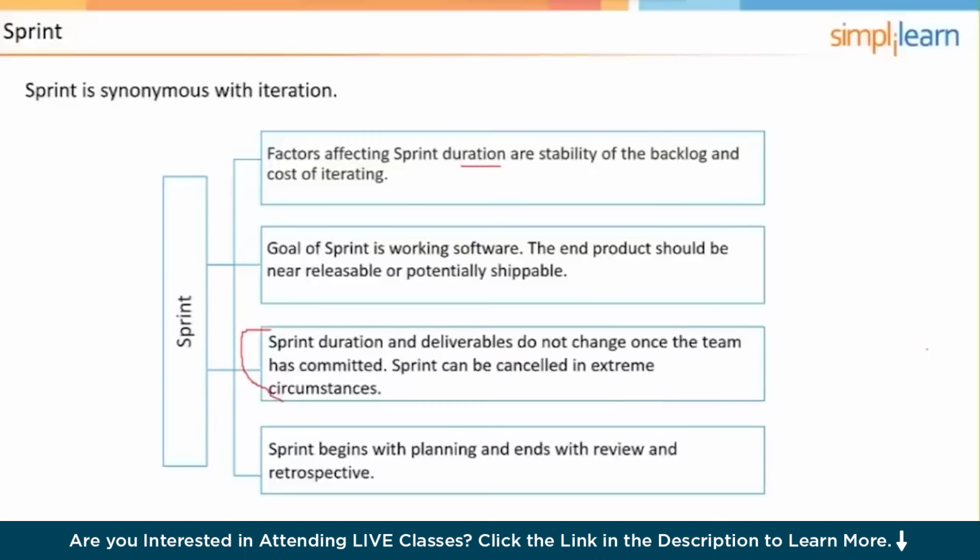Is the Scrum Master going to be there, likely as a facilitator? Is the product owner going to be there? Maybe, maybe not. If the product owner is there, the product owner could maybe answer questions and help clarify. But the product owner does not weigh in on what went well, what did not go well, and what we are going to do differently. That is all owned by the team.